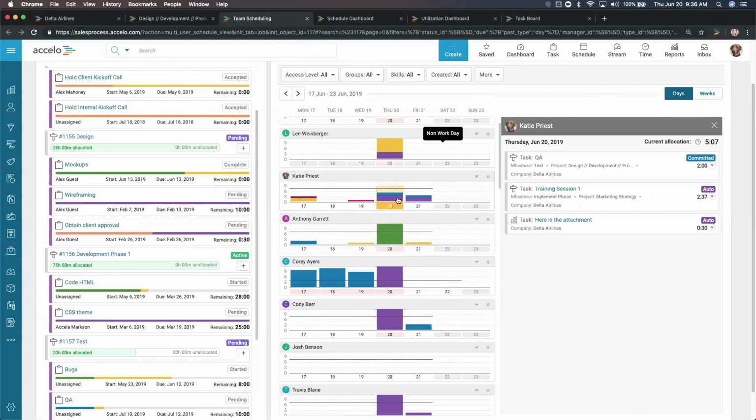It's spreading it out nicely so that as a traffic manager, as a project manager, I don't have to manually go in every single day and book out 4 hours for my team. I can auto schedule it out and spread it out nicely across their calendar so they know every day I'm working 4 hours on this long task.